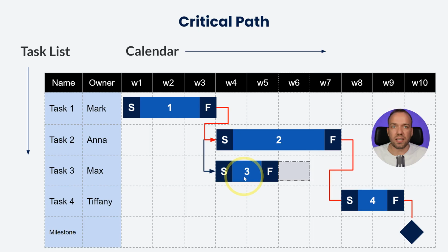And once you see the critical path, the red line through the project, you have to assess what are the critical tasks. And if you're a really good project manager, maybe you can think about how confident you are that those are managed. For example, you have to assign your most capable resources on the critical tasks because this will determine whether you will finish the project in time.